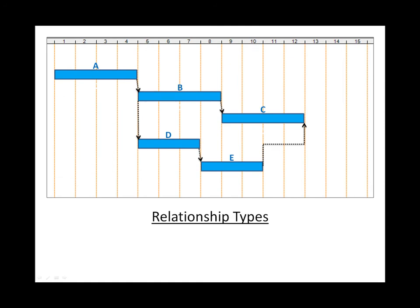I've taken our tasks and made relationships between them creating a network. First kind of relationship is a finish to start relationship. Finish to start is probably the most common type of relationship. This relationship says that activity B can't start until activity A is complete.